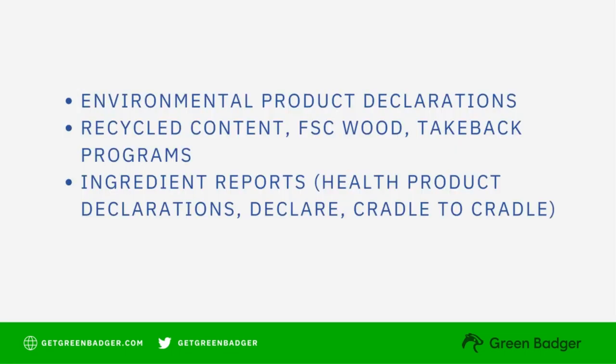Products could potentially have environmental product declarations or recycled content. Wood products could possibly have Forest Stewardship certification, and there are some products that have take-back programs, which means that the manufacturer will take back the product and recycle it at the end of its useful life. Ingredient reporting is another type of attribute a product could have. Ingredient reports tell us what products are made of and include health product declarations, declare labels, and cradle-to-cradle certificates, as well as some others.